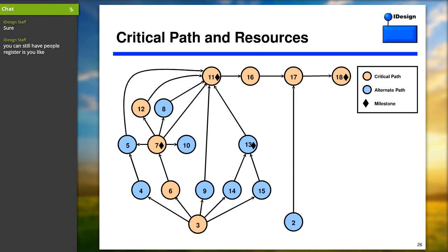There's another float which you use in project management, not project design, called free float, which is to what degree can you move a non-critical activity before it bounces against another activity you've already scheduled. That's called free float. It's less relevant for project design, much more relevant for project management. Free float is not simple to calculate because it has dependencies on downstream activities. It requires some spreadsheet or some MS Project to do. But by and large, that's how you do it.